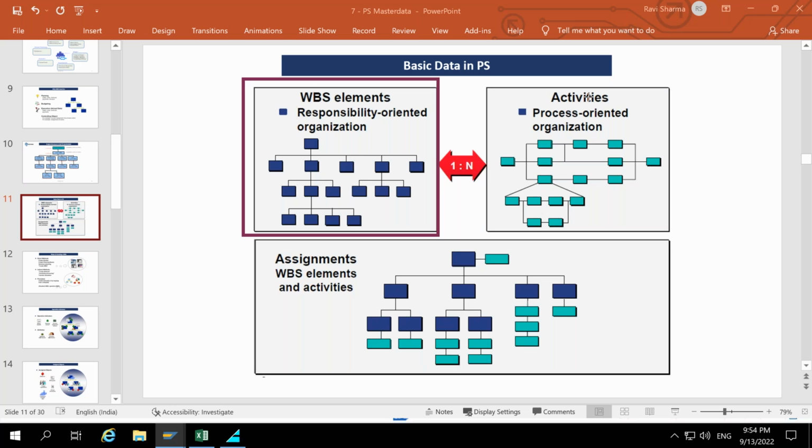Flow of activities means, let's say we have a civil work package, and under the civil work package we have the foundation work. Foundation work consists of many small activities. For example, we are constructing a house on farmland. So first we will cut the grass, then we will do the excavation, or maybe the land filling. Then after excavation, we will do some heavy foundation work. Then we will do the column work. Then we will add some ground walls like that.